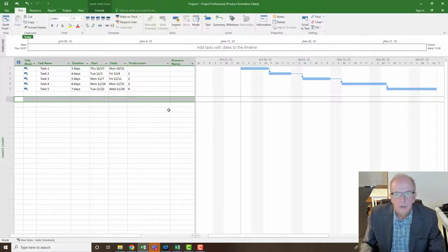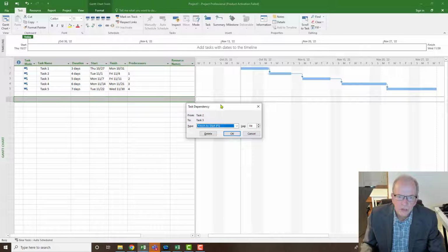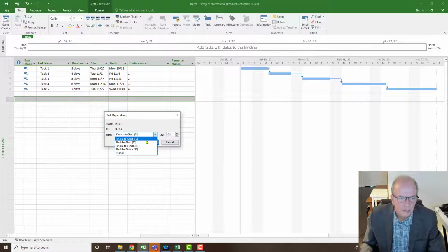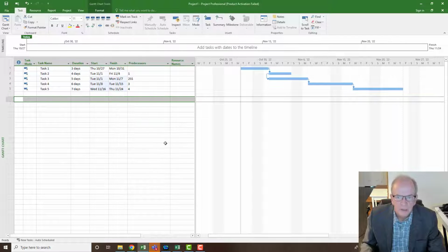Okay, so the next one is different types of relationships. So let's try a start to start relationship. So finish to start. Let's put start to start. So this is going to be starting. Watch what happens here. It's going to be starting once activity 2 starts. So what that really means is activity 3 cannot start unless activity 2 starts, right? So it's very related to the start of the activity, it's not necessarily related to the finish of this activity, although task 2 is, but it is very related to this activity starting.